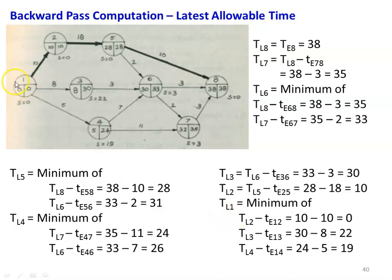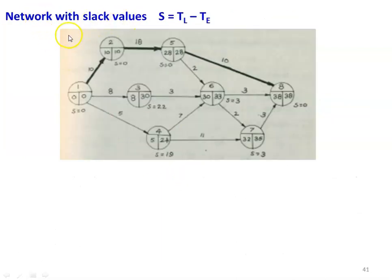For TL4: two outgoing arrows — minimum of (TL7 minus t(4,7) equals 35 minus 11 equals 24) and (TL6 minus t(4,6) equals 33 minus 7 equals 26). The minimum value is 24, so TL4 equals 24. For TL1: three outgoing arrows — minimum of (TL2 minus t(1,2) equals 10 minus 10 equals 0), (TL3 minus t(1,3) equals 30 minus 8 equals 22), and (TL4 minus t(1,4) equals 24 minus 5 equals 19). The minimum value is 0, so 0 is written here. All TE and TL values for all events are now calculated and written at the bottom of the circle. The slack is 0 for event 8: 38 minus 38 equals 0.